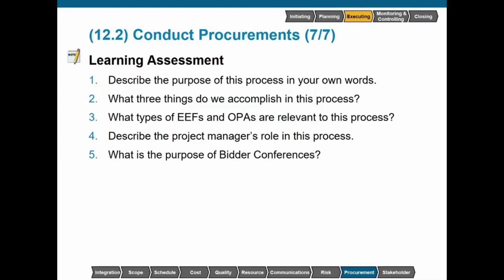Describe the project manager's role in this process. The project manager's role is to assist with and support the negotiations by answering questions and providing information if we have centralized purchasing. For decentralized purchasing, they may be the lead negotiator and the authority for signing the contract.